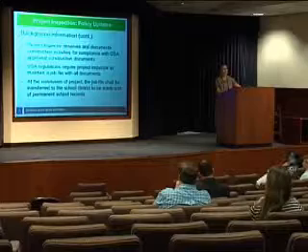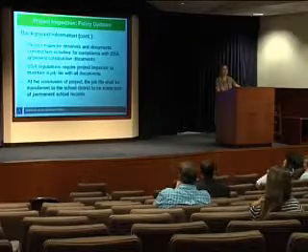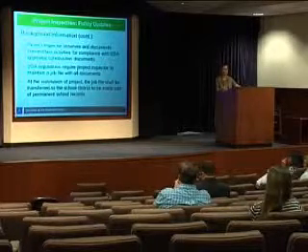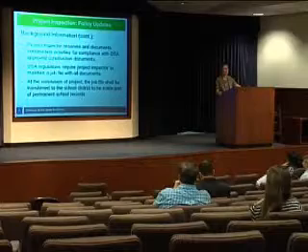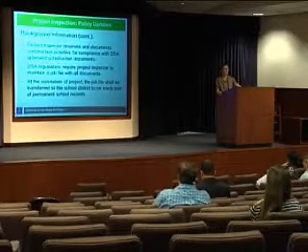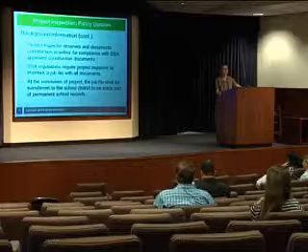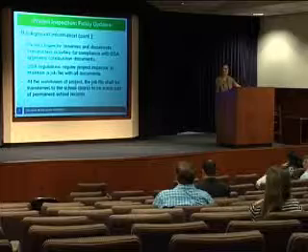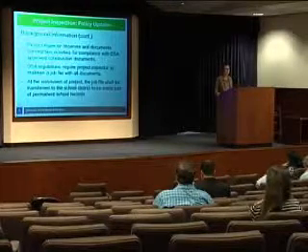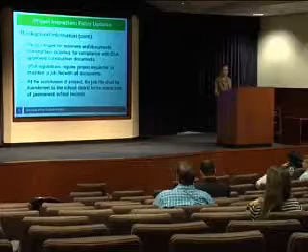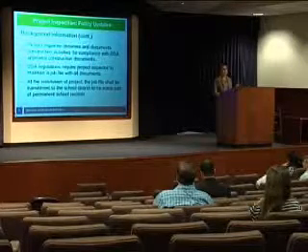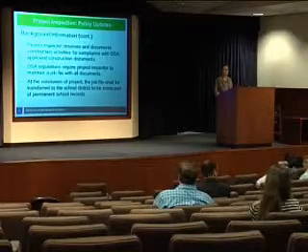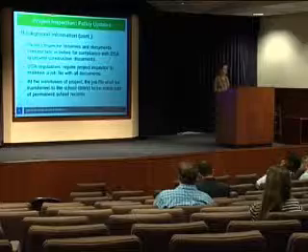Everything in that job file that basically traces the construction of the project from beginning to end has to be made property of the school district, with the exception of those things that belong personally to the inspector, like code books. But everything else must be transferred to the school district. It becomes part of the record. It makes it much more conducive for the school district to conduct future projects because they will have paperwork on previous construction on the same buildings. And what we did in this current revision of the IR, we've clarified that. So the IR takes the requirements of our regulations and puts them into a document that is, we hope, well organized and easy to understand and can be used as a guidebook.